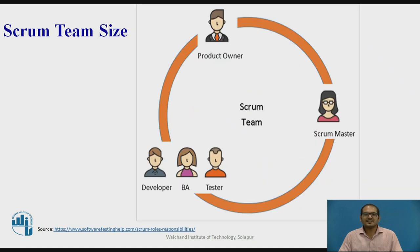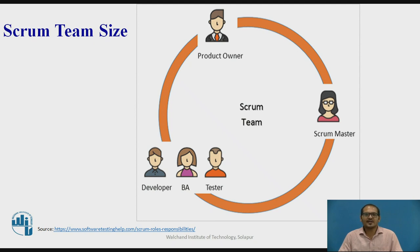Let us see the Scrum team size. The recommended development team size in Scrum is 6 plus or minus 3, that is from 3 to 9 members, which does not include the Scrum Master and the Product Owner. Now let us move ahead and discuss each of these roles in detail.